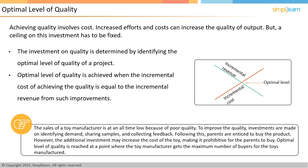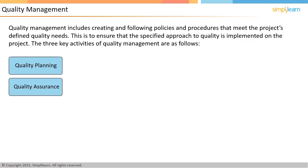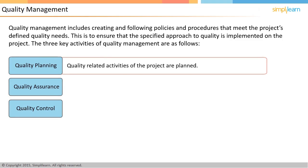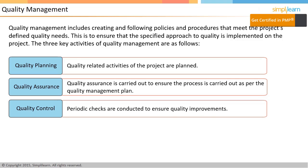Now that we are clear on the concept of quality, in the next screen let us discuss quality management. Quality management involves performing activities like creating standard policies and procedures and ensuring that those standard procedures are being followed properly in the project. It aims to ensure that the project meets all the initial agreed requirements without any deviation, and that the specified approach to quality is implemented on the project. Three broad activities are done as part of quality management: quality planning, quality assurance, and quality control. Quality planning is the first step when quality-related activities of the project are planned. Quality assurance is the next stage of implementing those quality plans. Quality control is the last stage when periodic checks are done to see if project quality is improving.